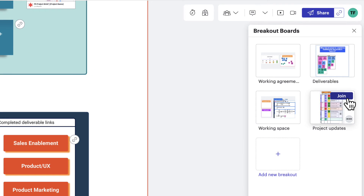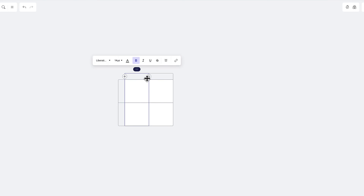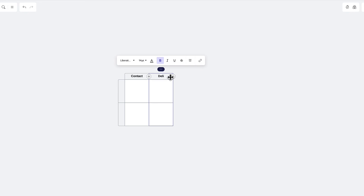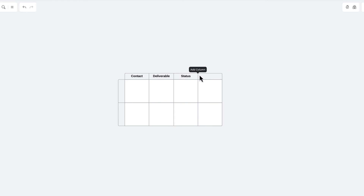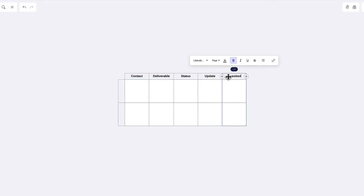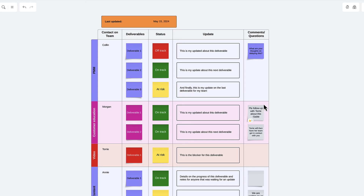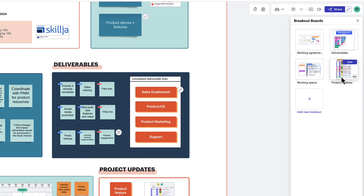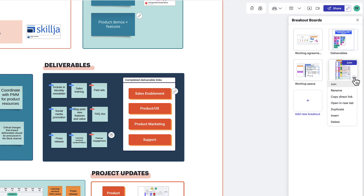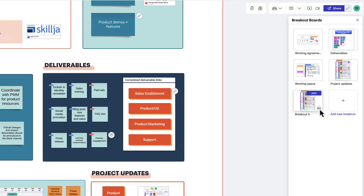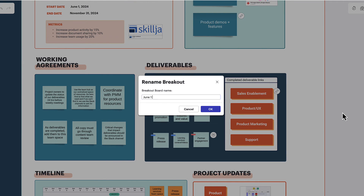For status reports on a temporary project, create a breakout board within the team space and add a dynamic table. This table will showcase the deliverable owner, the deliverables, the status of them, and a space to add sticky notes to ask questions. With every new meeting you have, you can just duplicate that board and change the date for the team to edit. This will give you a repository of the work completed all within one Lucid document.